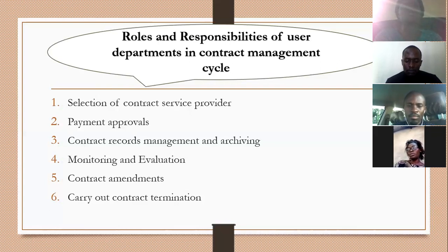It's also very important that payments are usually done in relation to the certificates of compliance that have been attached. For example, the account should be in the names of the service provider, and the nature or the currency should be very clear and specified. But it's important to note, as I wind up, that there are service providers that have already been blacklisted in the common market.